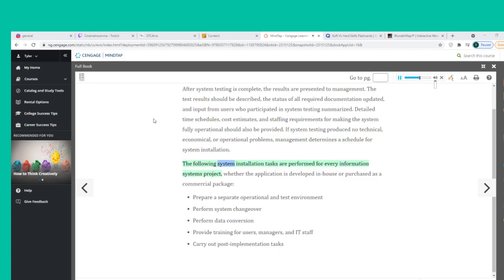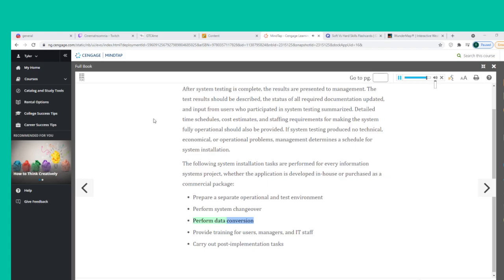The following system installation tasks are performed for every information systems project, whether the application is developed in-house or purchased as a commercial package: prepare a separate operational and test environment; perform system changeover; perform data conversion; provide training for users, managers, and IT staff; and carry out post-implementation tasks.